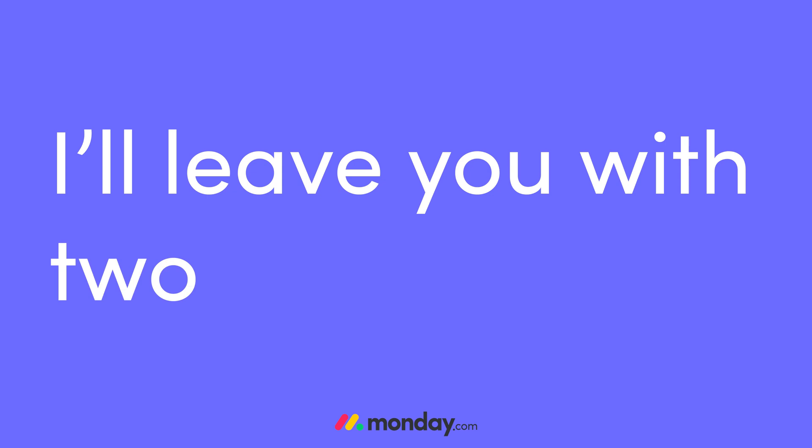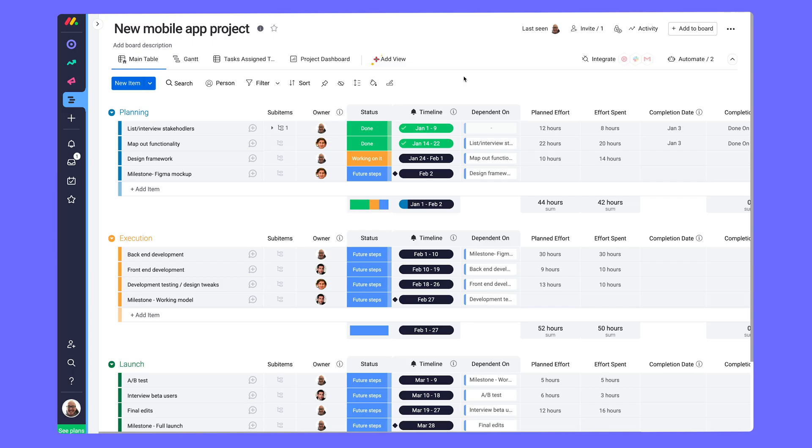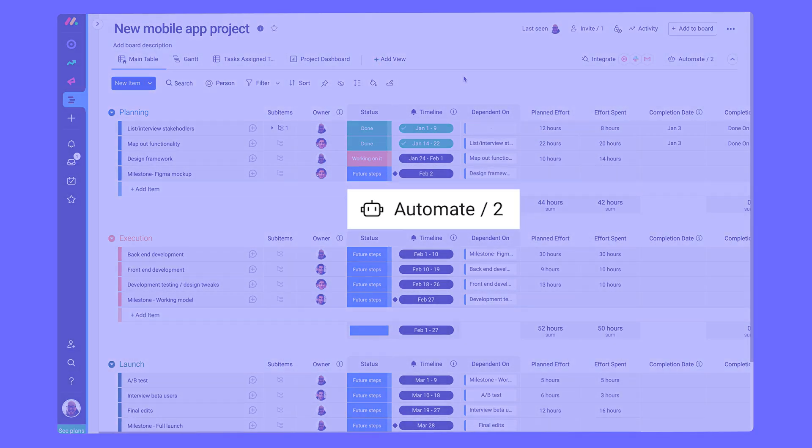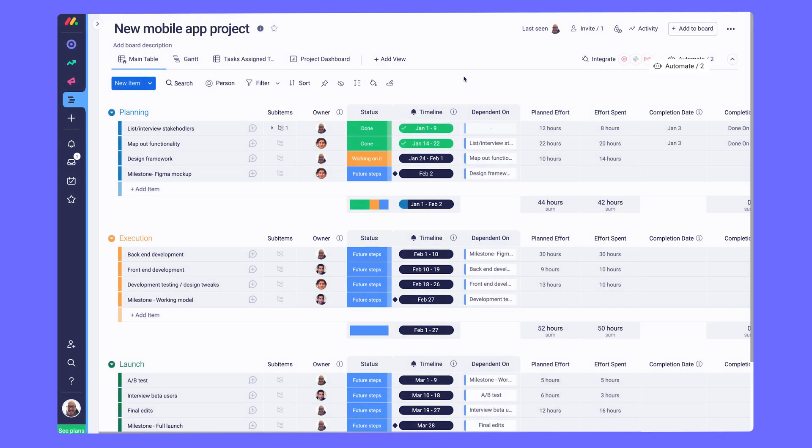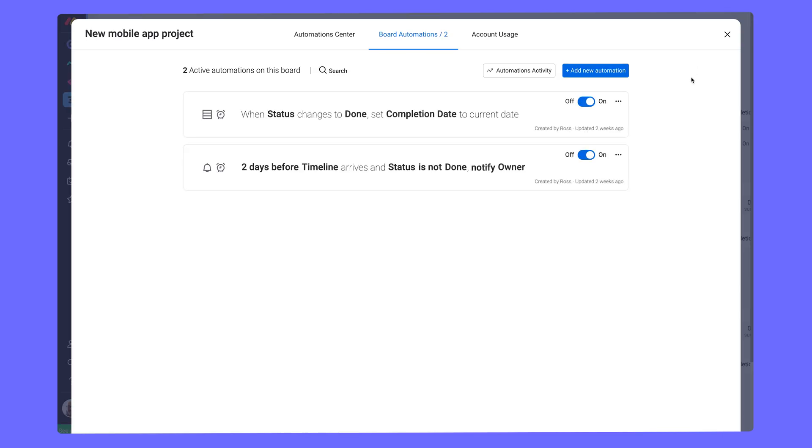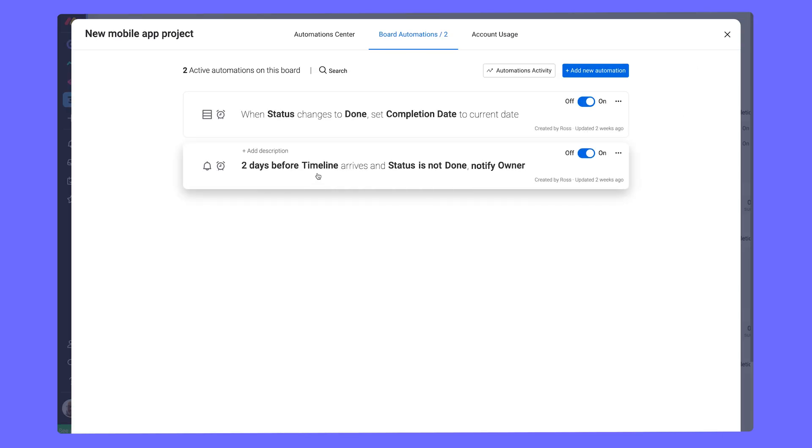I'll leave you with two final tips. Use automations to keep things organized and moving forward. Here, notify the task owner two days before the end of the timeline for a task if the status reads not done.